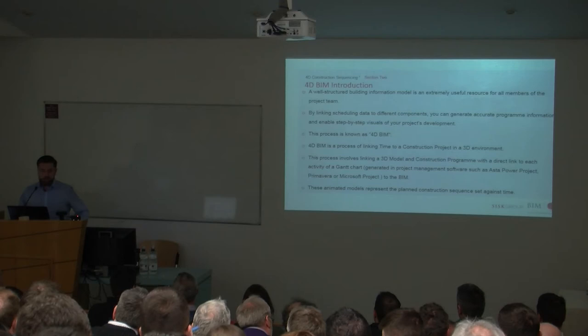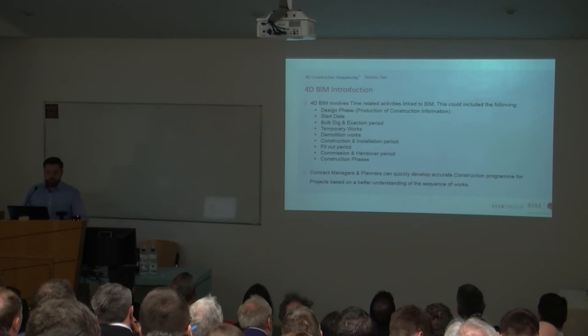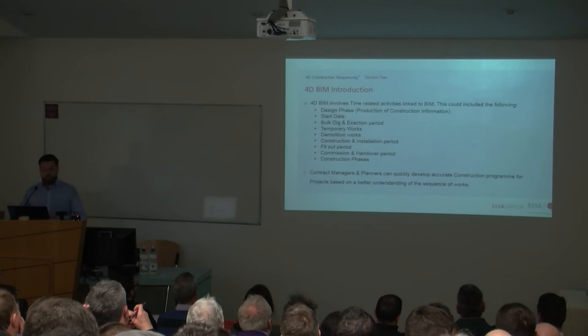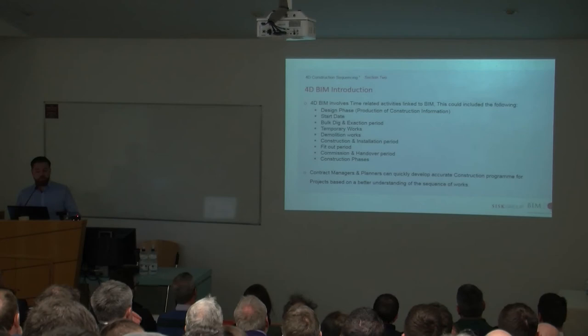So, some of the things that will be included in 4D. 4D involves time-related activities linked to your BIM model. This includes the following: your design phase, your production of information. In terms of design and build or traditional build, if you can link the actual production of information physically to your model, you can see how your model is going to develop at an early stage. The start date on site, bulk dig, excavation period, temporary works, demolition, construction, installation period, fit out period, commissioning, handover,